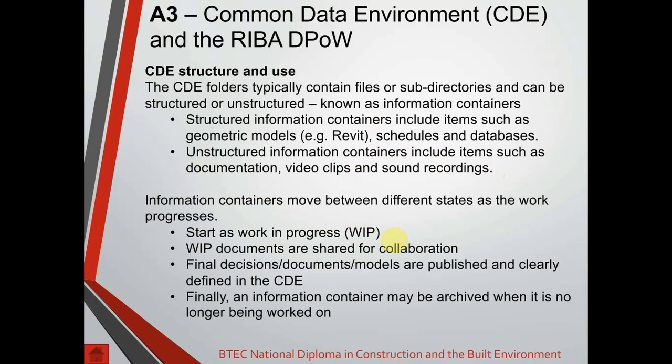You then have final decisions and documents and models that are published, and they are clearly defined in the CDE. So you should know when you're looking at a document within that common data environment if something is a work in progress or if it is the final decision. There might still be some minor changes to that final decision, depending if things change, but you should know that if you go to a final decision document or model or folder, it isn't likely to have changed since you last looked at it.